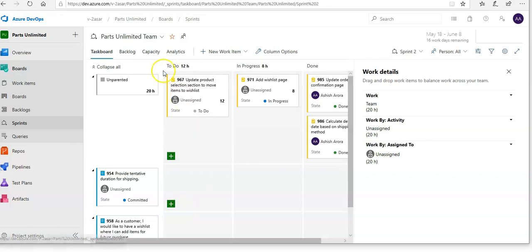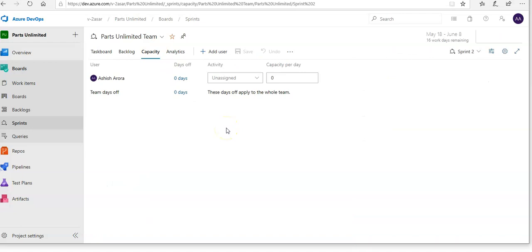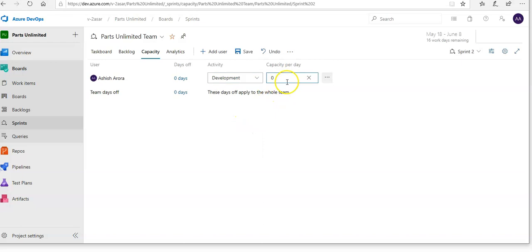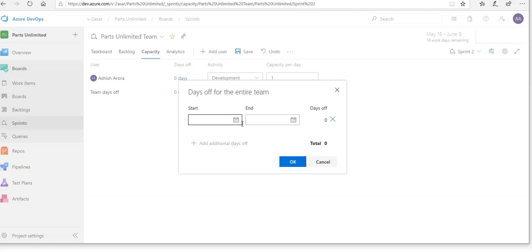If you click on Capacity, you can assign it to an activity and define the capacity. For example, if you're going on vacation, you can set your vacation days. Let's say you spend five work days during the current sprint within the next few weeks. Make sure that in coming weeks you account for week-offs as well. The capacity view has been updated to reflect the available bandwidth. This exact number may vary depending on how you have done the planning. One convenient feature of the board is that you can easily update key data inline. It's a good practice to regularly update the remaining work estimate.